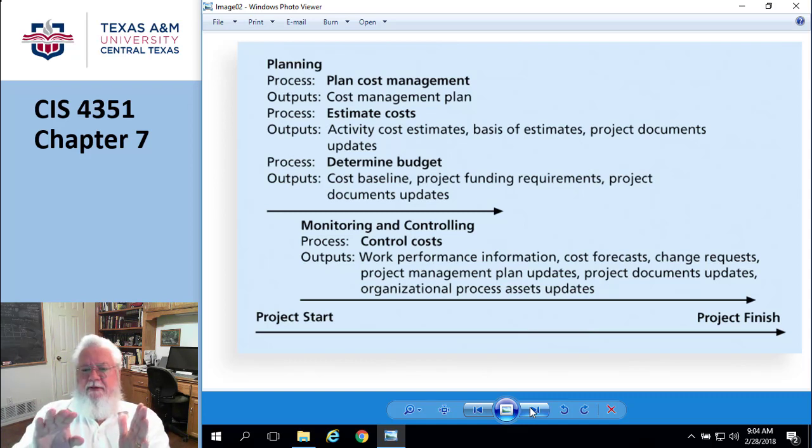So now I just need to figure out, okay, that's going to take 4 people to be able to do that in 4 weeks of time. So 4 weeks times whatever the salary is, boom, I know what the cost. So once you've got the schedule done, you're pretty much on the way to a cost estimate for IT projects, because there's not normally that much material associated with it. I mean, yeah, you got to buy a server or something like that, but those costs are incredibly easy to come across. So it's not as difficult as it sounds.